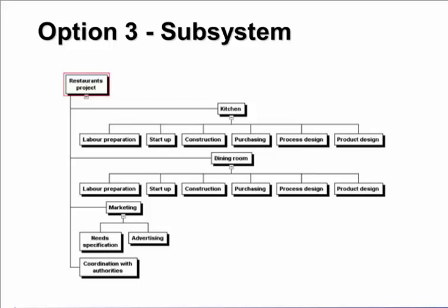another work breakdown structure, and again, these are dependent upon each project, and the choice of which depends upon the capabilities of each of the members. So you then have a subsystem-based allocation. In other words, the kitchen, for instance, is used, and what are all the steps to create the kitchen? What are all the steps to create the dining room? So you can see, even though the headings may be similar, their details are significantly different. Okay.